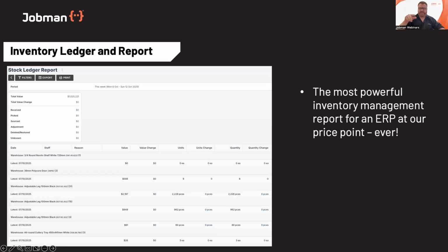From there, we can say, awesome. The team then picks 8 boards. Or they use 9 boards and then run an alert and have to grab an extra board. That means there was a stuff up. So from our job costing point of view, while we estimated 10, we've used 10. We're okay because we have a margin, but this job is not going to be as profitable as we thought it was. Understanding those differences between things coming in and out is extremely important. And now you'll be able to track those as well.